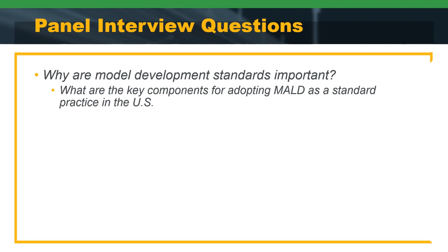Certainly, Alexa, and great question. I can tell you model development standards, I think, are the key from a consultant point of view to really clearly articulate what those requirements for the model are. You know, what are we really being asked to do? And I totally agree, John, with your point. These model development standards, including level of development, including model element breakdown requirements, are important to actually have at the scoping of the project, to understand exactly what we need to provide to meet the owner and the contractor's needs. And I do think that should carry all the way through and be part of the contractual deliverable.